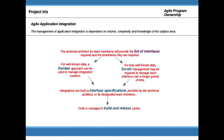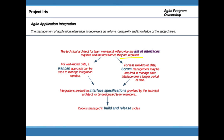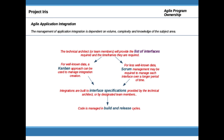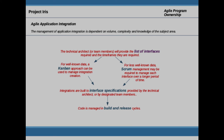Application integration typically starts with an architect looking through the requirements and determining a list of interfaces that will be required, as well as determining the complexity and the time frames they'll be needed. For a well-known application with well-known data and fairly straightforward interfaces, Kanban is a natural approach to manage those integrations. If the data is less well-known and integration development will take longer, then Scrum might be the process the application team uses. Whichever process is used, the interfaces will be built according to the interface specifications created by the technical team, and the code will be managed into the build and release cycles.